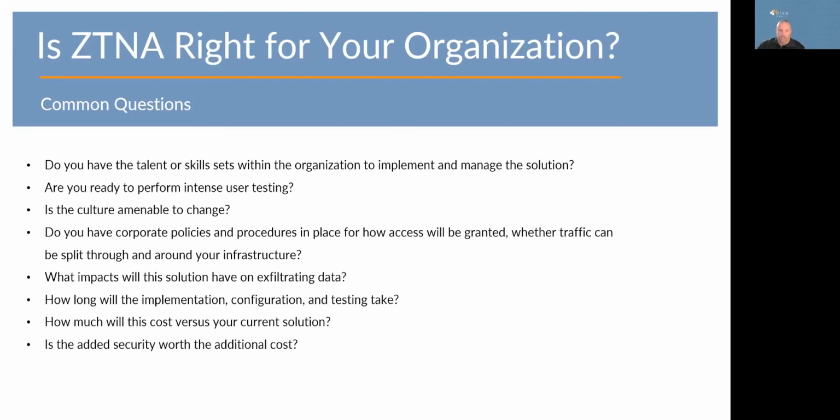This is something you're going to have to look at, because while you're going to hire professional services in most cases, and they'll come in and give you a statement of work, they're basing it on if everything works great. Everyone's network is different. Everyone has business challenges, and it rarely, if ever, goes as planned. So you need to consider that. Do you have deadlines? Do you have audits? Can you get this stuff done before those things take place? What's your budget look like for the year? Is it going to spill over into another year, et cetera?